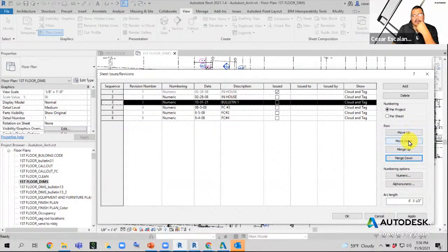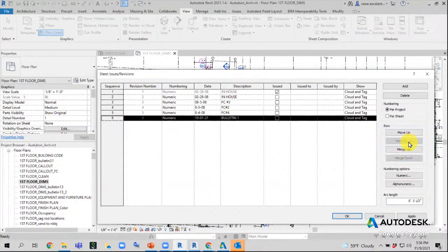Sometimes when we're submitting to municipalities, they require all the revisions and they want to see 1, 2, and 3. If you just give them 3, it's not enough. So if we're internally issuing revisions to a contractor, the difficulty is that in reality, we want to couple them all to the submission to the city.